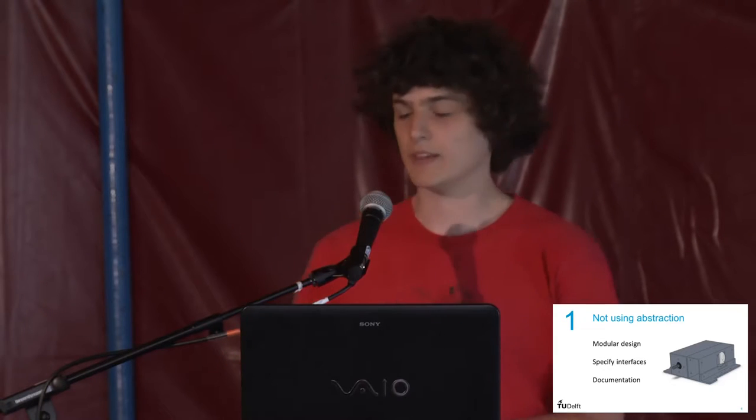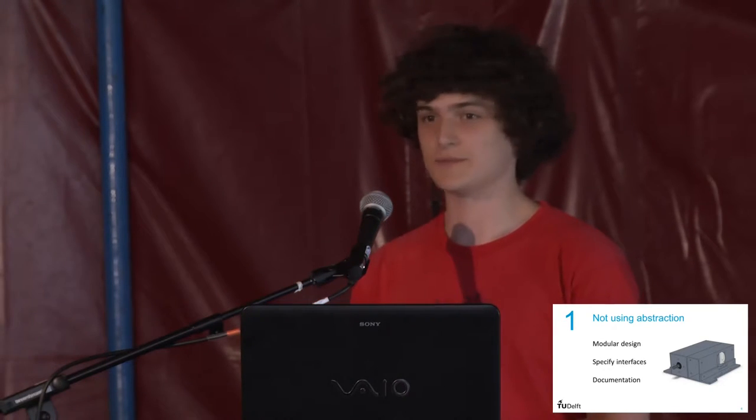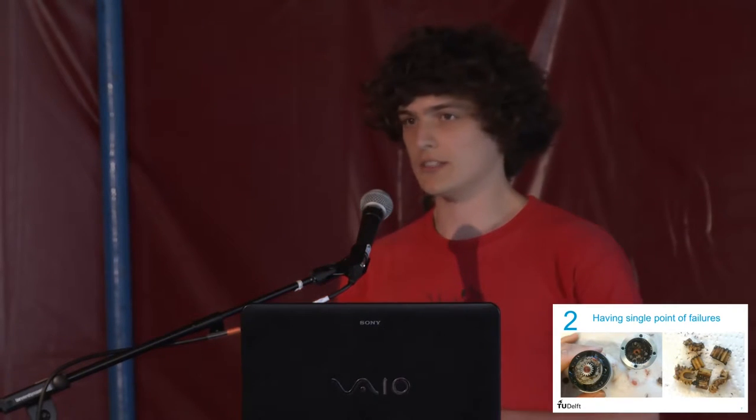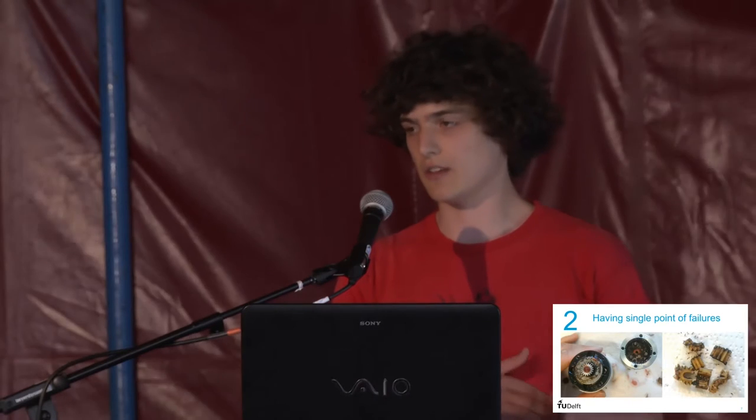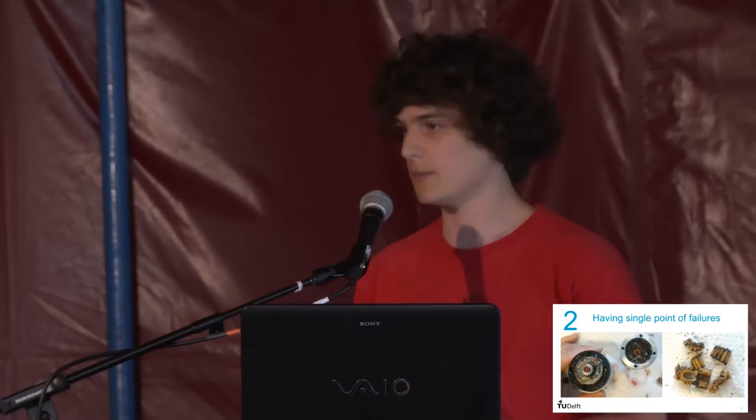That was problem one. Problem two: having single points of failure. When you look at this as a software or hardware engineer, you probably think, 'Duh.' But it's actually more complex than that — it's not only about the engineering part, it's also about the logistical part. In our example, we ordered three different kinds of motors to build a robot: one from China, one from England, and one from Germany. We ordered them three to four weeks before the actual start of the project, because these things typically have some lead time.